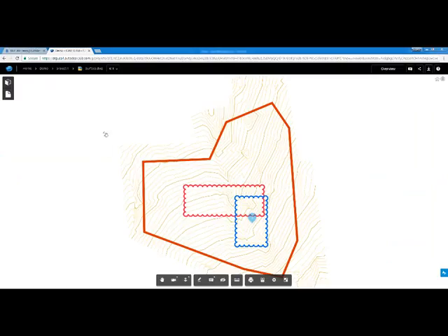One more thing about versioning here. Next to the drawing title, you'll see a version has a pull-down menu. In this menu, you can see all versions that have been created of this drawing. If you need to go back to an older version, simply hover over an earlier version and hit Promote. Now this won't erase other versions, it actually creates a new one.